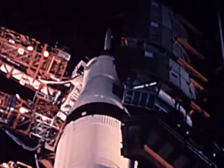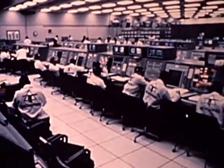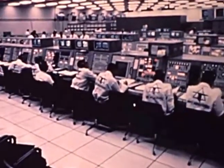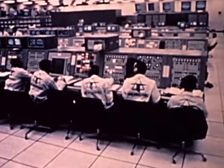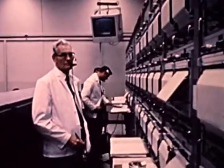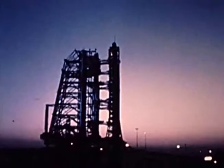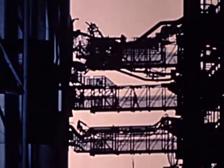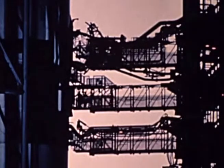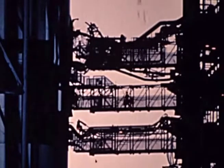Preparation went smoothly through the first portion of the quarter, passing the flight readiness test successfully. Near the end of April, the first stage pre-valves were inadvertently opened while the main valves were configured for leak checks. This resulted in dumping almost 5,000 gallons of fuel overboard, creating a partial vacuum in the fuel tank and some dimpling of the upper tank bulkhead. Quick work on the pad by engineers and technicians averted what could have been a serious delay. Careful repressurization of the tank returned it to its original shape.